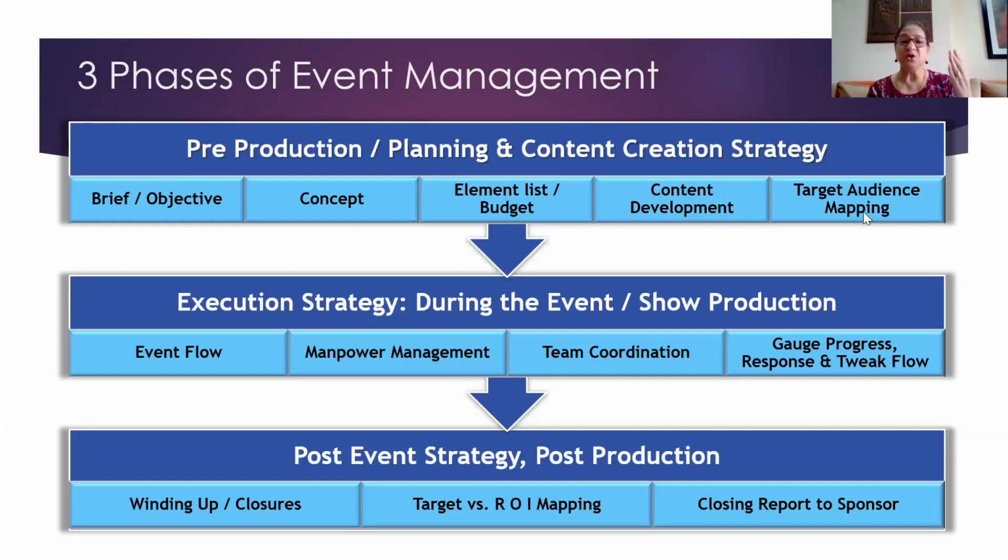Obviously, there has to be good team coordination. Like I've always said before, good event planning is each one given their responsibilities, doing their jobs well to the T, and continuing to interact with each other. We have weekly meetings. As we get closer, we have 2-day meetings, every 2 days after the end of the day, to take stock of progress.